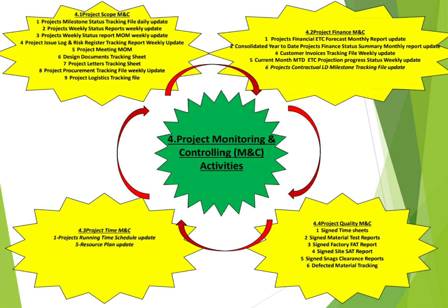In this tracking sheet, you list the projects, the phases in columns, and you need to specify if you completed this phase or not. This will help your event management, when looking at this project milestone tracking file, to know quickly where every project is and what the status is.